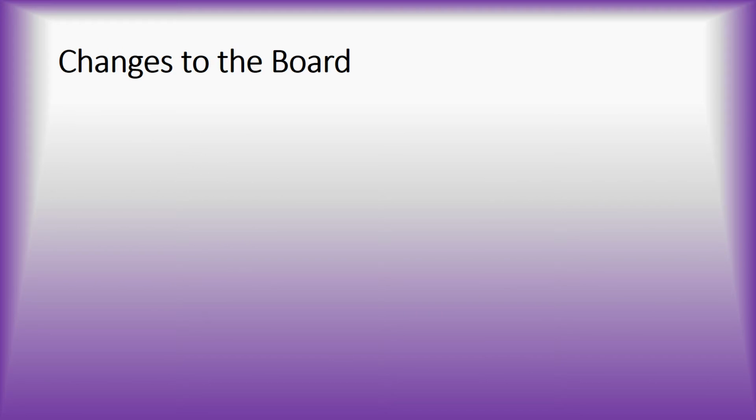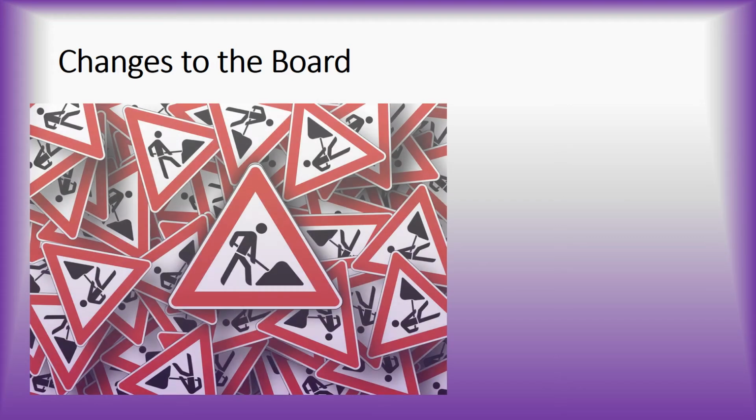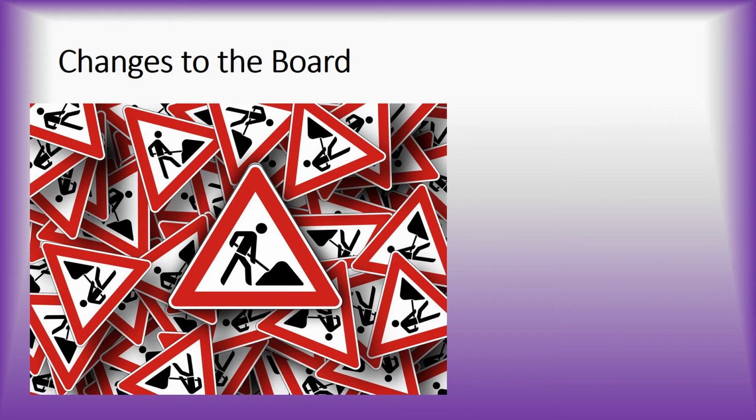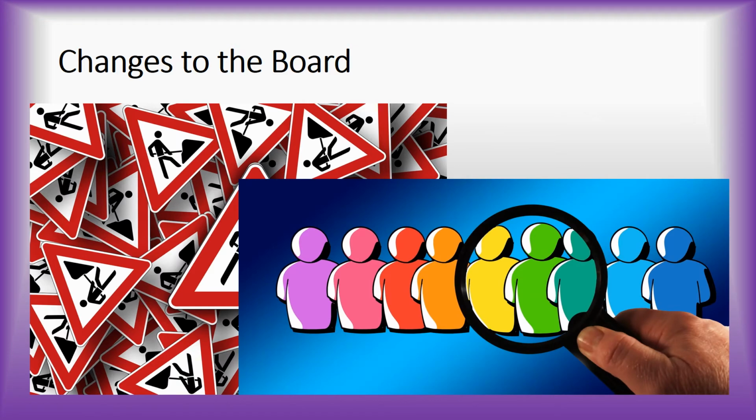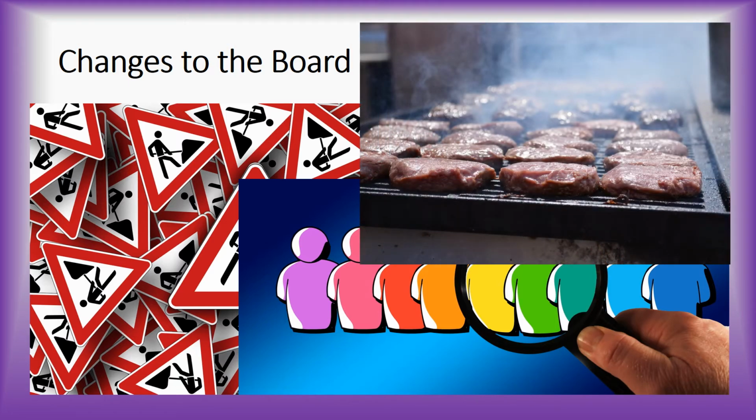What issues do we need to address yet when making the Kanban board? Kanban limits work in progress, so we need to figure out how many tasks we can do at once for each step. For fast food, the work done falls into several categories, and there can be different people specializing in each category. The person responsible for drinks often doesn't also make sandwiches, so we need to make special lanes for that work. Finally, sometimes work on food is delayed while food is cooked, so we need to find a way to handle that as well.